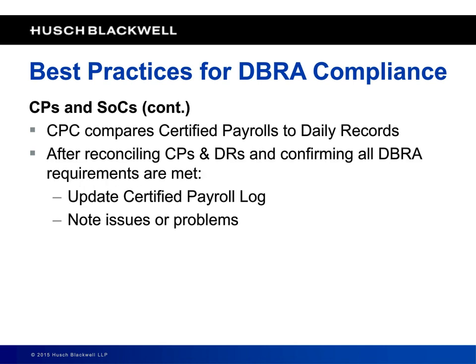And again, your certified payroll clerk is going to compare the certified payrolls to whatever this daily record is. And once they reconcile the two, my suggestion, another best practice here, is that you keep a log of each and every certified payroll and statement of compliance that you receive. Have them keep a log, keep it in Excel or some other program to show when you received it, and that you're logging it in as received under the sequential number that is listed on that certified payroll.